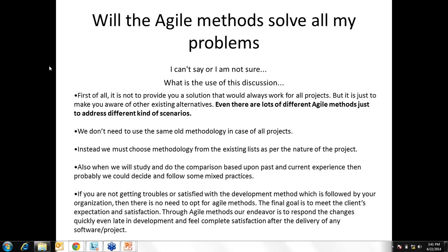And then another question is from Satish Jadhav: what is the main difference between waterfall method and agile method of project implementation? Yes, the major difference is that in waterfall you will have defined phases, and after one phase you will go to the next phase. That means you will have a requirement gathering phase, then analysis and design phase, then coding, then testing, and then implementation, promote to production, and maintenance.